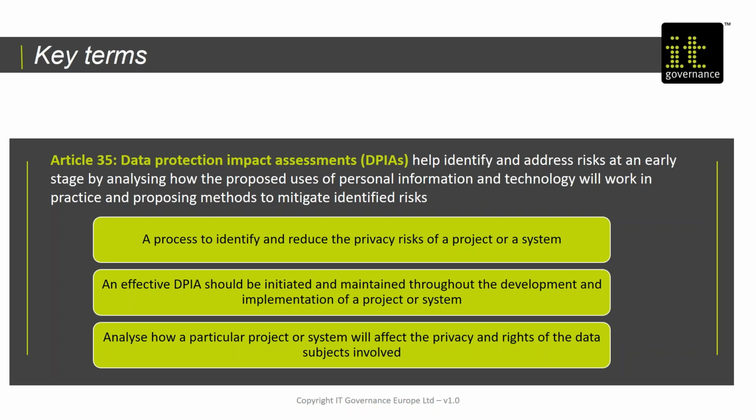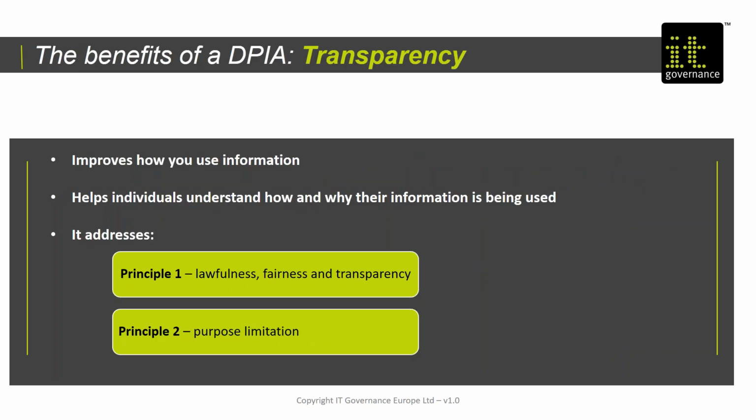So if you are planning a project, you should build into the project plan the need to complete a DPIA, which goes towards then demonstrating data protection by design. A DPIA is the overall process used to analyse how what you're planning to do with personal data is going to affect the rights and freedoms of the data subjects. Conducting DPIAs is a good way to demonstrate both that you are taking steps to consider privacy risks and how to mitigate them from the start of the project lifecycle.